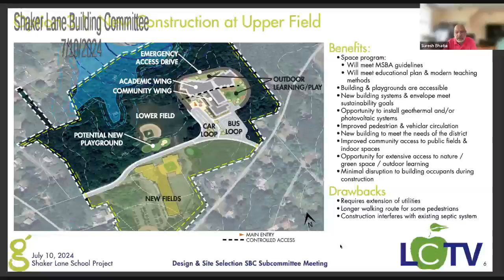And to answer the question, Michelle, you have regarding the ease of construction, new construction is much easier than the renovation, because in the renovation with the existing building in place, you're almost working with a construction management at risk, whereas the new construction, you can almost go design bid build, which is inexpensive compared to a CMR project.